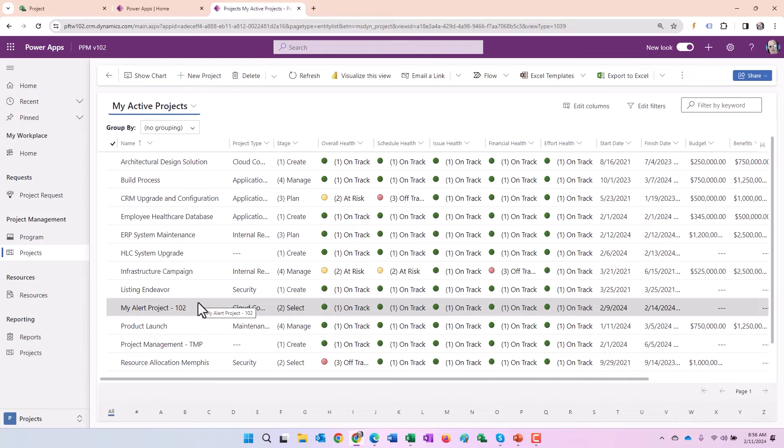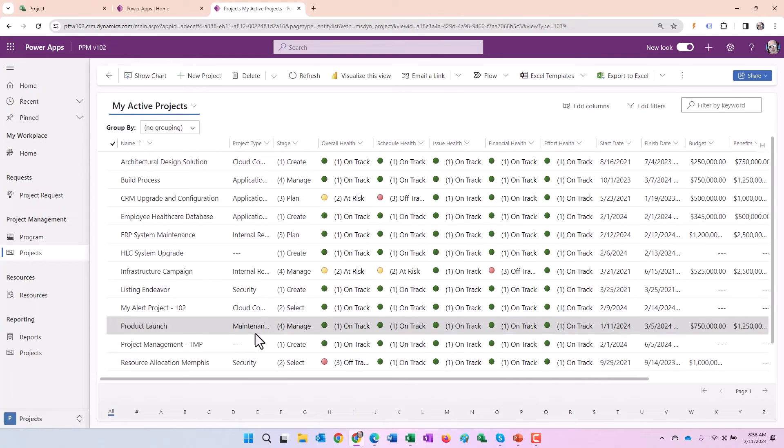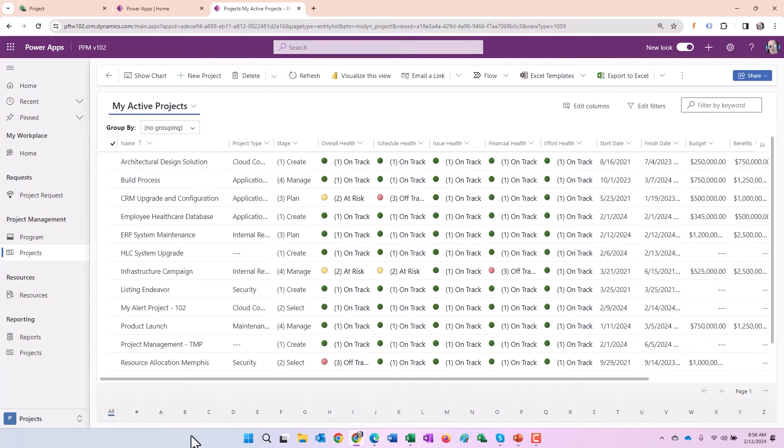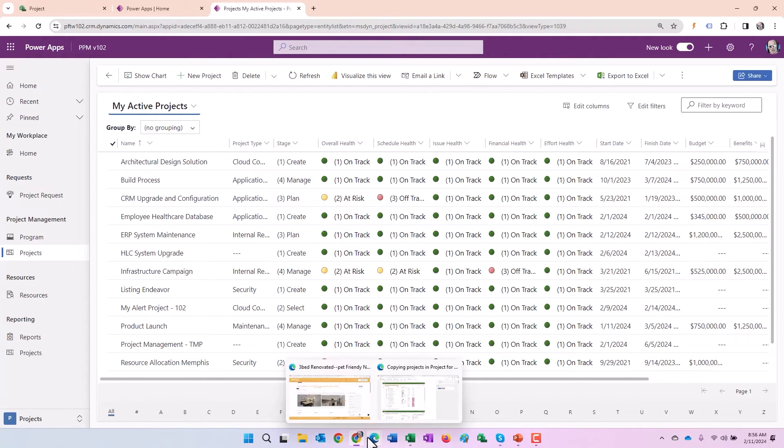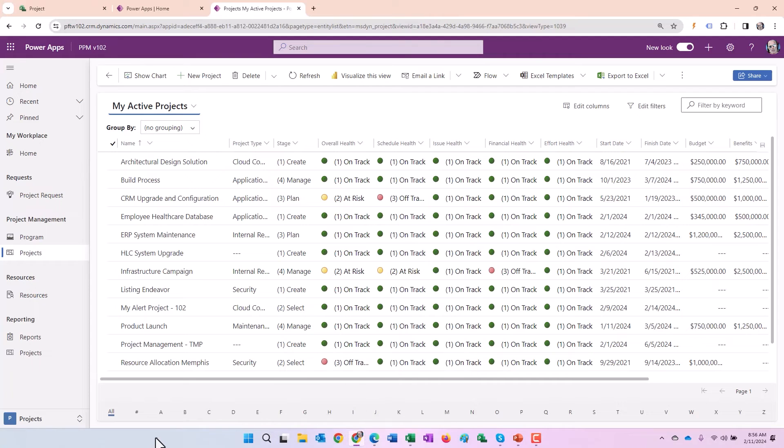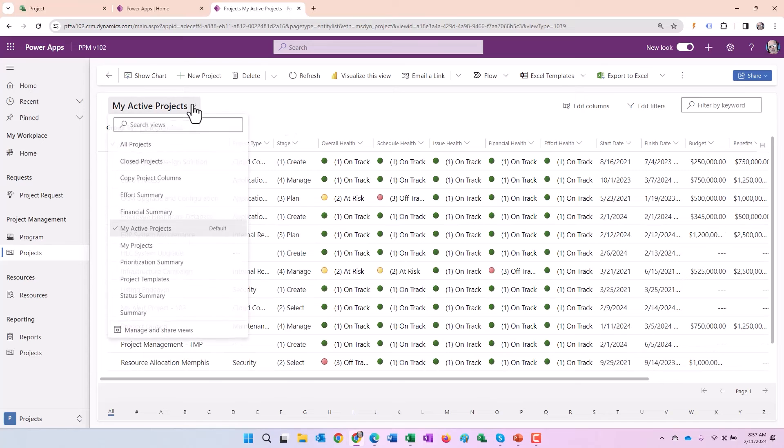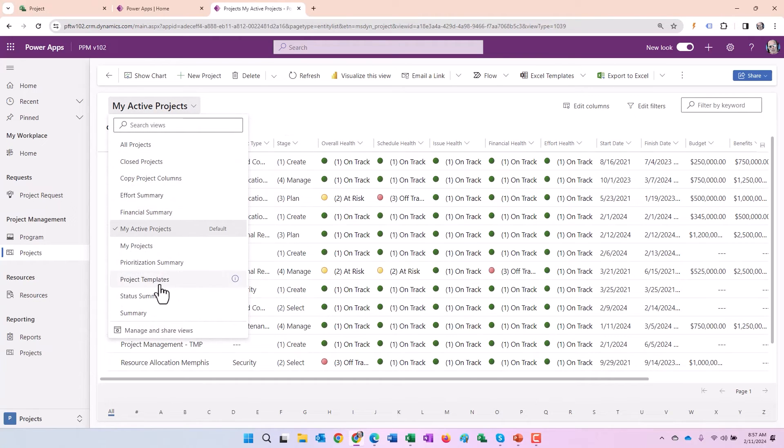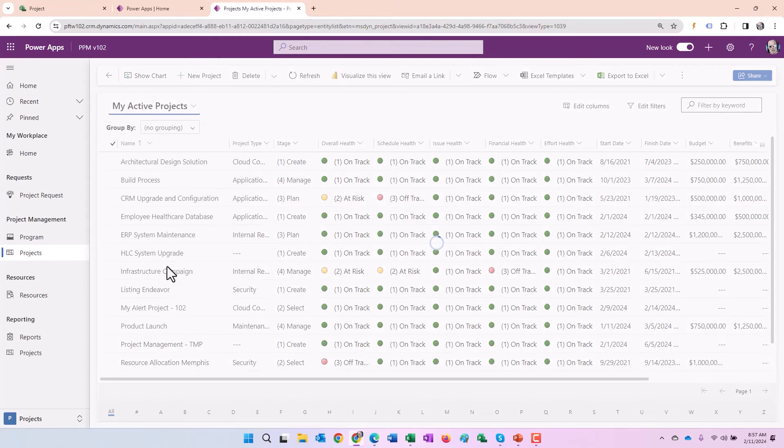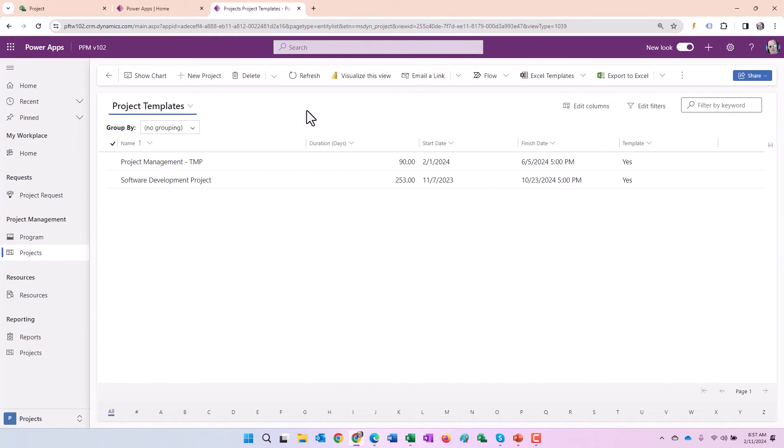Great. So next thing I wanted to show briefly is, how could you utilize templates in the system? Well, you can definitely use the copy project functionality, but you can take it one step further. If you want to utilize projects as templates, that's great. But the one thing you might want to do is make those template files read only so that users cannot edit them. That way, the template's always going to be static the same every time you utilize it.